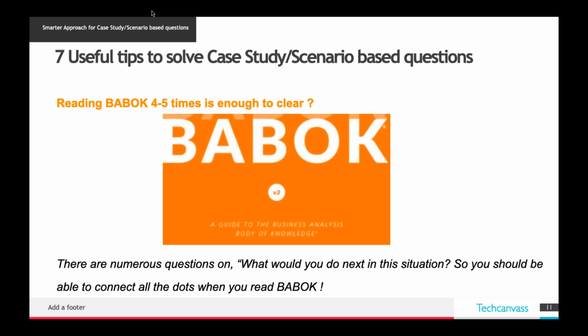Because once you fail in it, the stakeholders will understand that this product or MVP is not going to work. If you work on the other user stories first, and then come back and tell the user that the one story they wanted is not technically feasible, the client will ask, then why did you work on the other user stories? I want a complete product, not a half-baked product. This is the reasoning which IIBA expects you to have.